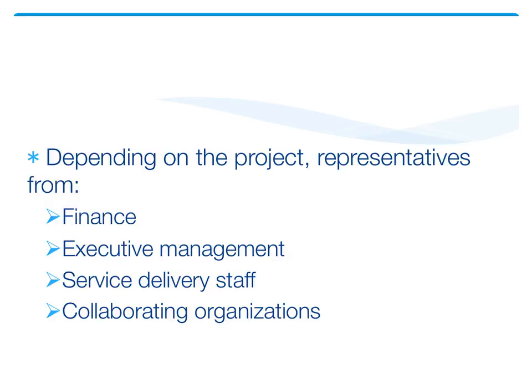A lot of times, as we all know, and you guys may be in this boat, you might be the guy who wears all the hats or the lady that wears all the hats. You might say, you know what, I'm the director of operations, and I really want to delegate this to my staff. I know the project planning is important. I definitely want to see it when it's done, but I don't want to take part in it. And when I'm working with clients on project planning, I really, really discourage that. The reason is that when you put together a project plan, you need to have buy-in very early, particularly if it's a very large project. And that's very hard to do if you don't have a decision maker in the room.